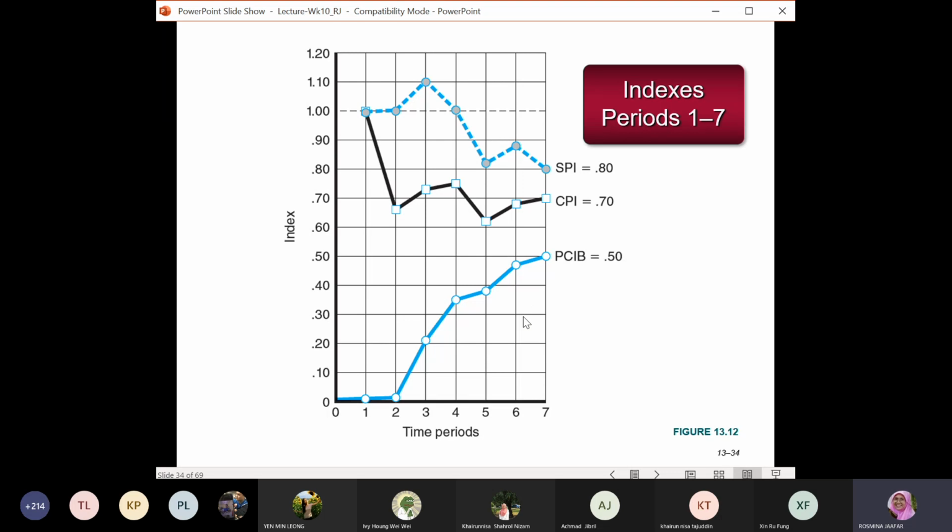Okay, here in terms of diagram, the SPI and CPI. So we have x-axis is always the period, a time period, and the y-axis is the index value. Index values is small number, and 1 is the optimum value. So here you can see positive value, and in this example, you have the values, many of it is less than 1. Only few activities, for short duration only, you have a positive index. This is ahead of time, but here when it's negative, behind schedule.